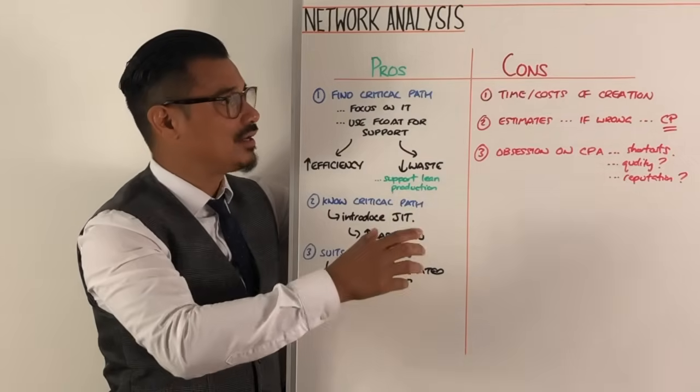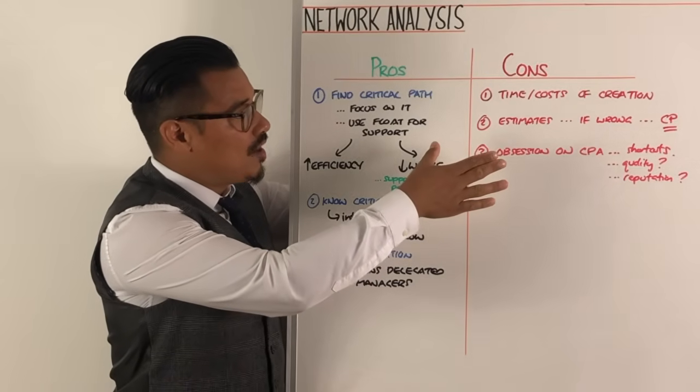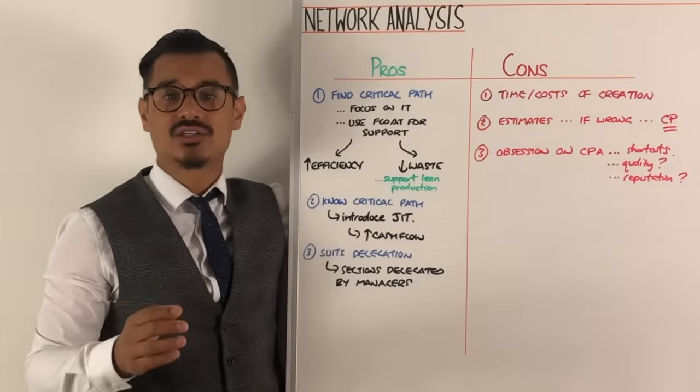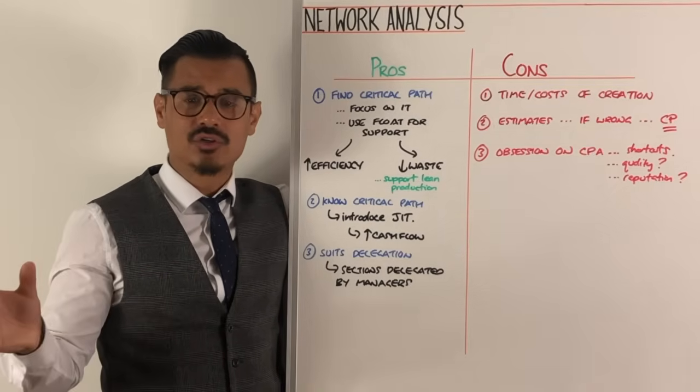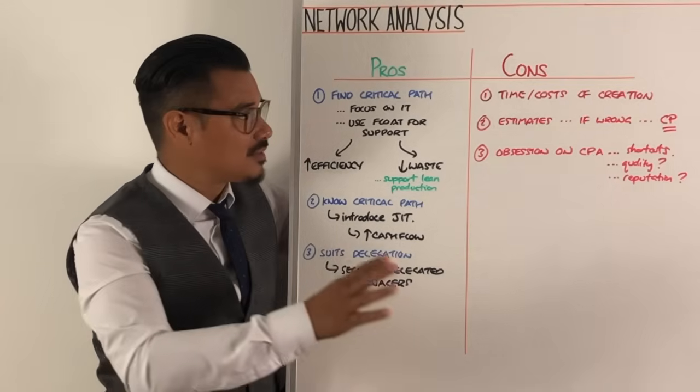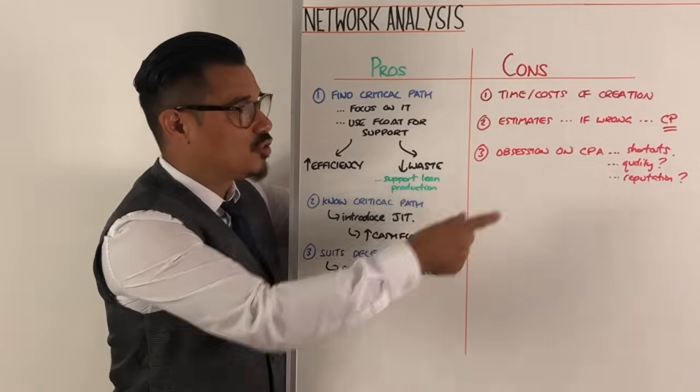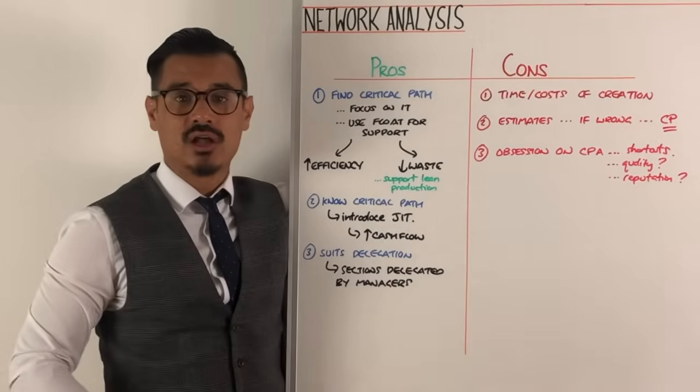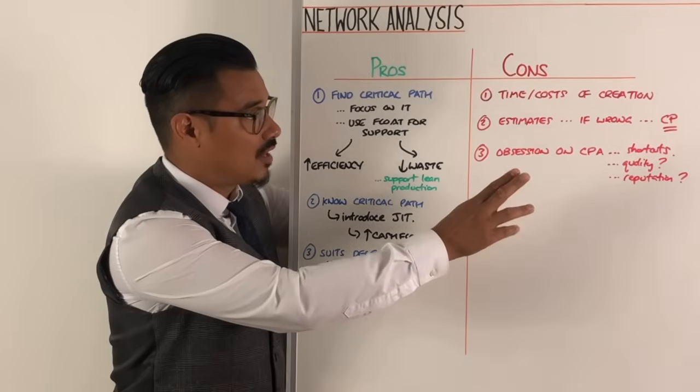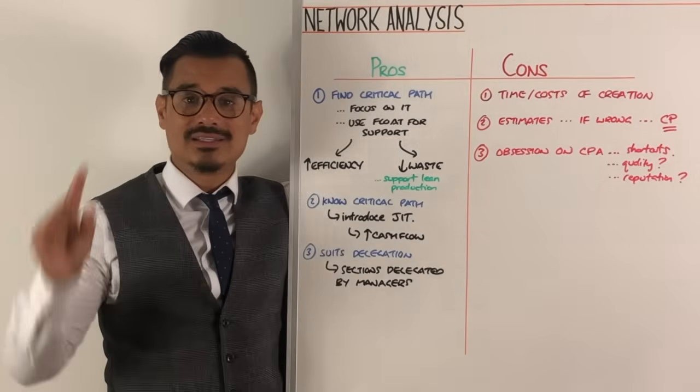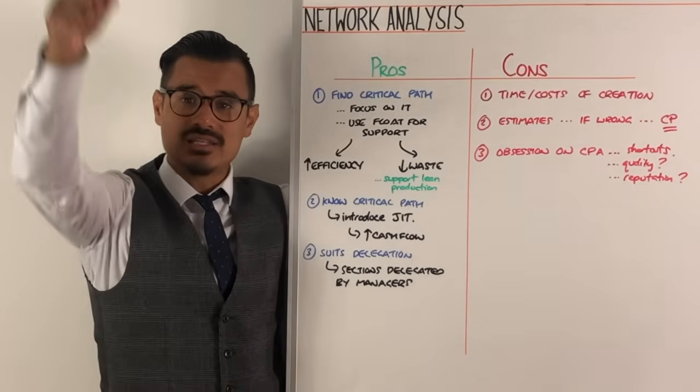Now the cons of network analysis, well firstly network analysis takes a lot of time to do, it costs money to do, you need someone with project management skills to create it. And the next thing is that what if the estimates are wrong? Because if the estimates are wrong for any of those tasks or the nature of those tasks, if they're sequential or if they are simultaneous, if you get that wrong it might mess up the critical path and then it's no longer actually the quickest route. So that's a problem there. So you need someone with skill and that can make accurate estimates. And the last thing is if you become so obsessed with the critical path and it's the only thing that matters, then it might lead to shortcuts along the way from managers or from subordinates that fear managers that they need to just keep on that critical path otherwise they're very much accountable for it. And shortcuts leads to lowering quality and if you get lowering quality and it hits the end customer then that could ruin reputation. So I hope that helps with network analysis and I'll see you in the next session.